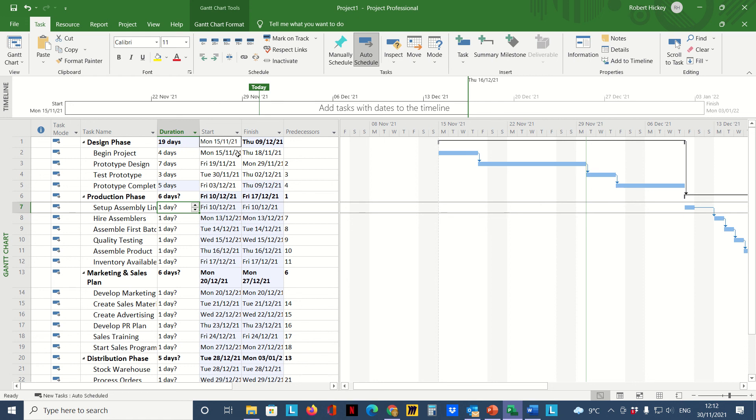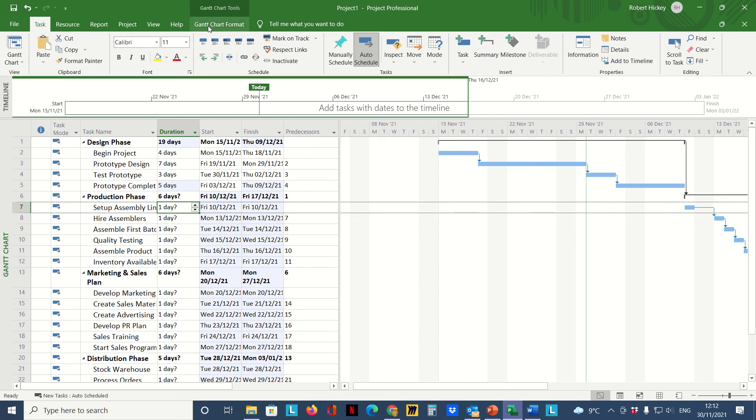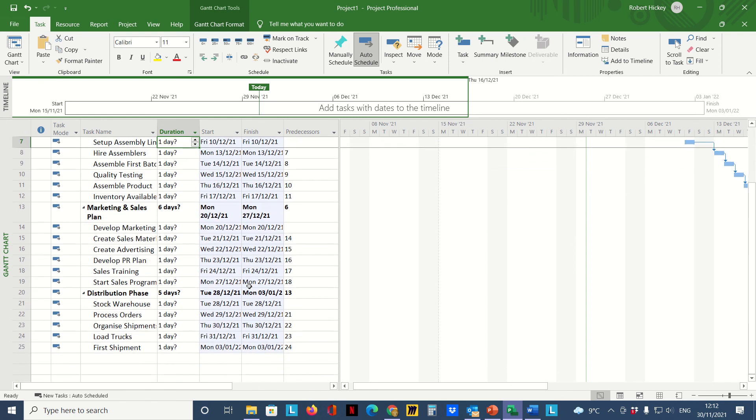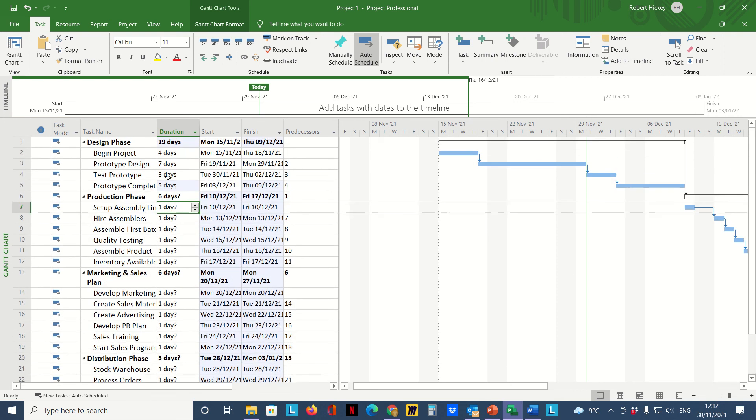Now if we look at something else over here, look in the start date. We have the 15th of the 11th, but look at all these. I didn't even type that start date in there into this column. I typed that in at the very start when I was setting up the project. I typed in one start date, that's it, and all these other dates are automatically generated by Microsoft Project based on the duration of your tasks and the link between the tasks, how the tasks are linked. At no stage will I ever type in any dates into any of these here.